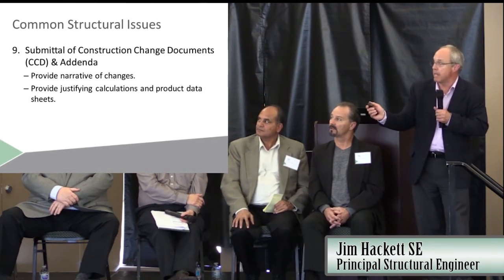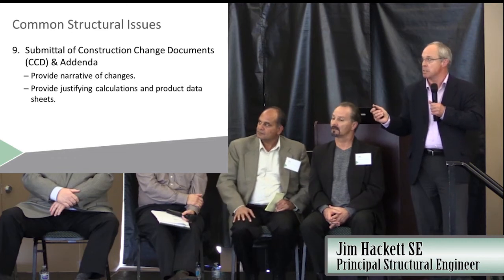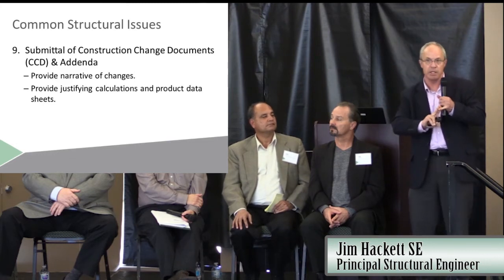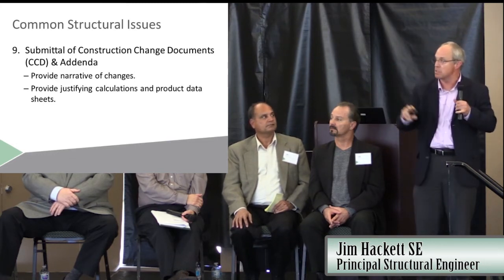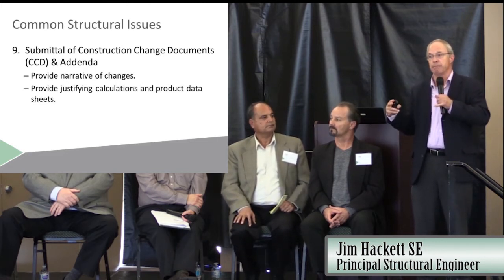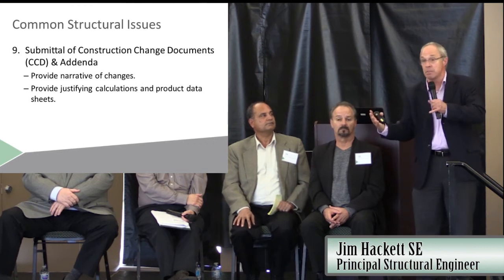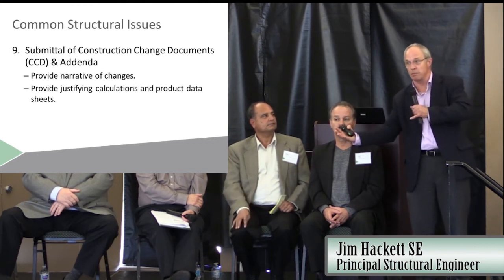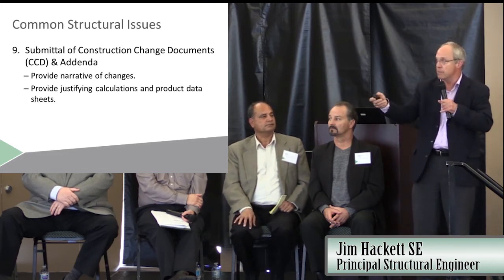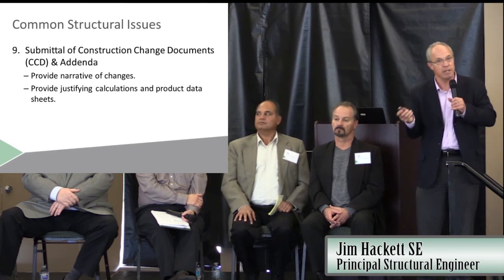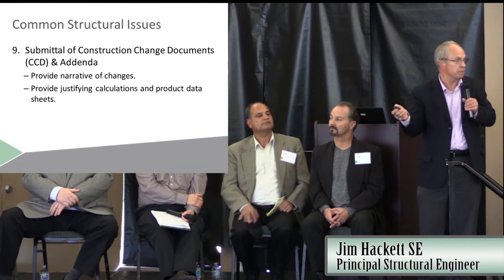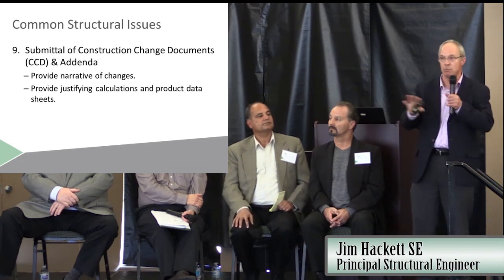And the last item that I really have here is the submittal of construction change documents. I think one of the things that comes out, whether it's submittal of calculations in your drawings, whether it's CCDs, is provide a narrative. Let us know what is actually happening. So often we get these, and oftentimes it's not the same person who did the original plan approval. It's not your field engineer, it's somebody different. And they don't really have a good sense of what's happening on that project. So provide a short narrative, even if it's just a two-liner, to say what the purpose of that change is. It makes a big difference and makes the review much easier.